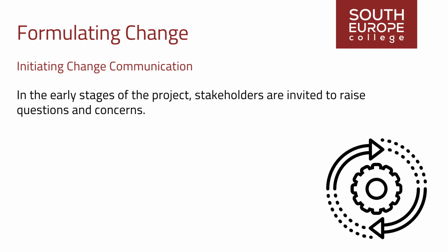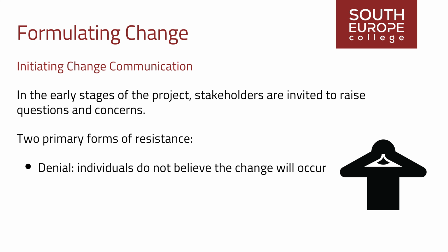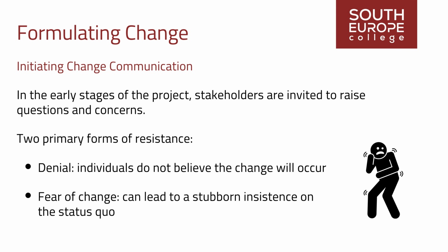In the early stages of the project, stakeholders are invited to raise questions and concerns. Two primary forms of resistance, denial and fear, must be addressed. Denial, where individuals do not believe the change will occur, may result in subsequent changes to project requirements. Fear of change can lead to a stubborn insistence on the status quo, potentially impeding project progress if not explored thoroughly.